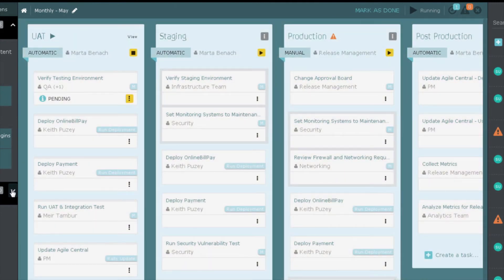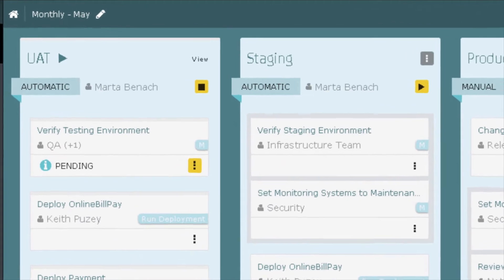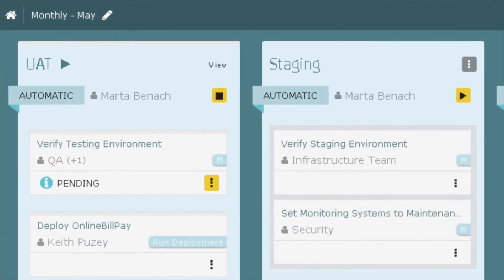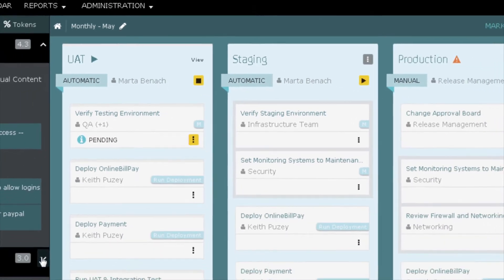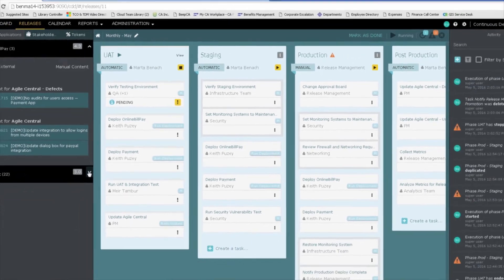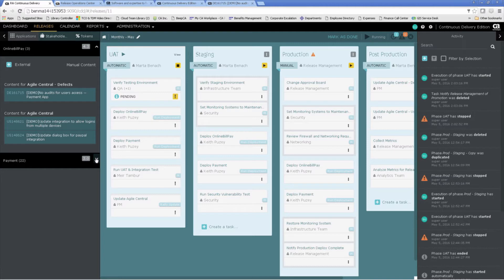Each one is comprised of different tasks, either manual or automatic, that are required for the code to move to the next phase. The UAT phase has manual tasks for verifying the environment, testing and notification. Automatic tasks are the actual deployments of the online bill pay and payment applications through the integration with release automation and updating Agile Central.